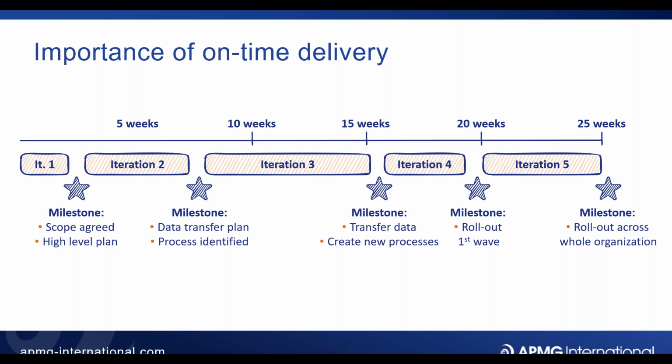And that's very important when we're bringing together the world of delivery and transition, or getting ready for the new ways of working. Because if you're starting to tell students, oh, you'll be able to access this portal from this date, and we're stopping paper application forms for accommodation from this date, then we better make sure that we actually deliver on that date. It's not just when something's ready, but we're saying when we're going to start behaving differently, and when people can actually get access to new things and stop doing old things. So time becomes something.